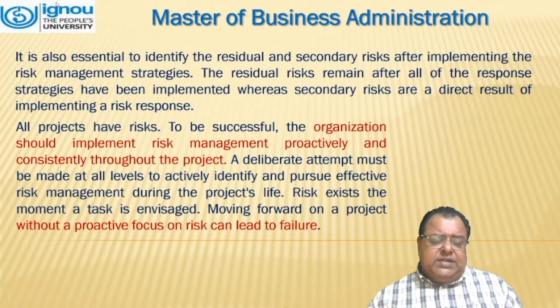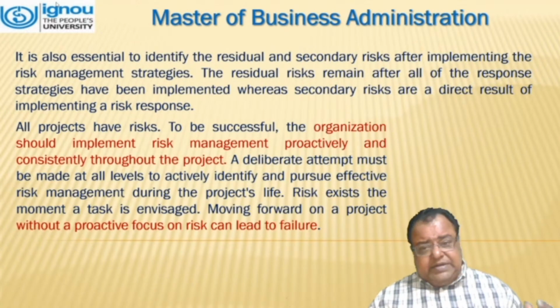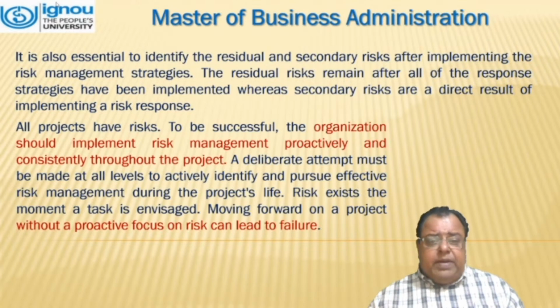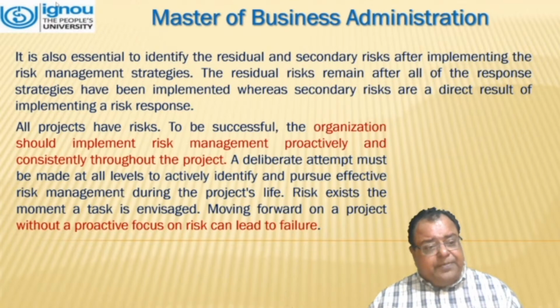It is also essential to identify the residual and secondary risk after implementing the risk management strategies. The residual risk remains after all the response strategies have been implemented, whereas secondary risks are a direct result of implementing a risk response. All projects have risk.